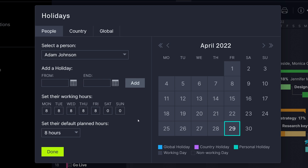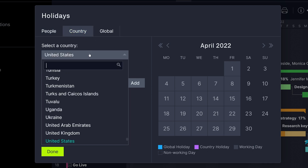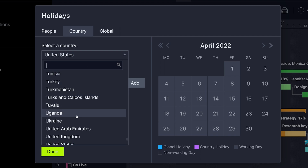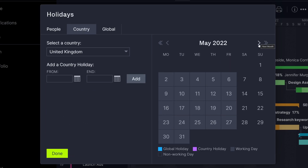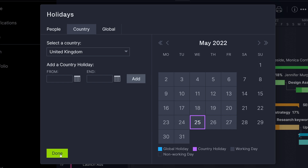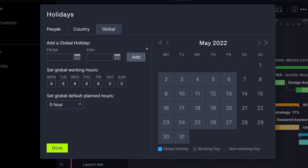If your team works in multiple countries and may have different holidays, use the Country tab to enter holidays for each country. These will automatically link to users by the country indicated on their profile. Setting global holidays will affect everyone on the team, and global working hours will be the default for anyone whose hours aren't otherwise set.